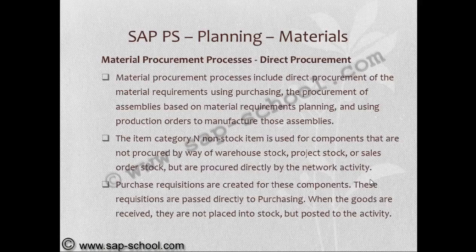Material procurement processes include direct procurement of the material requirements using purchasing. The procurement of assemblies is based on material requirement planning and uses production orders to manufacture those assemblies.